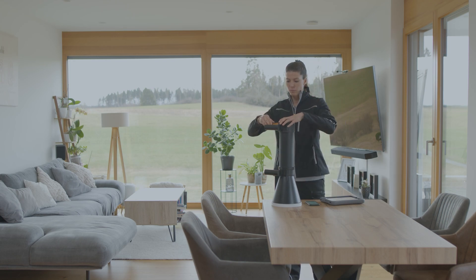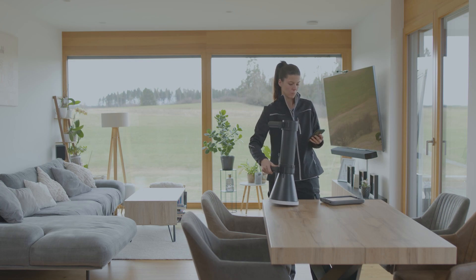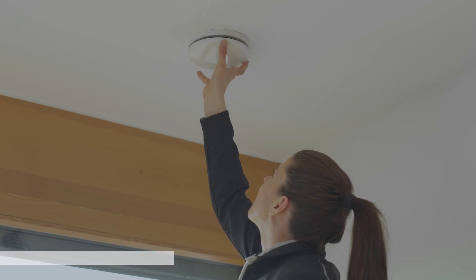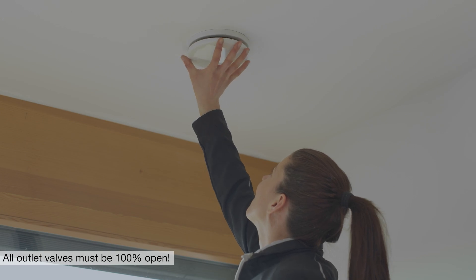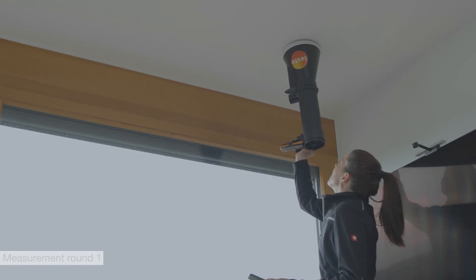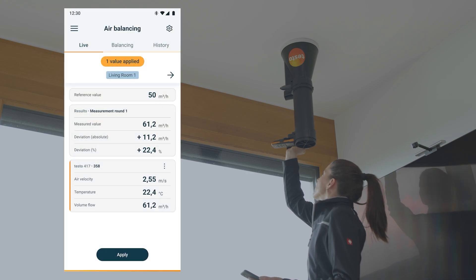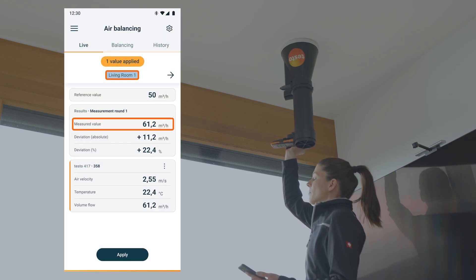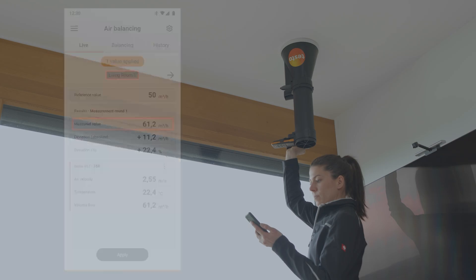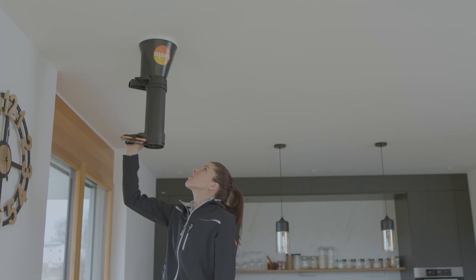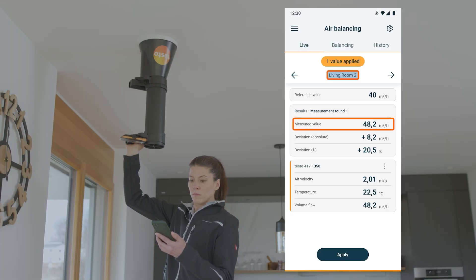In the next step, the first round of measurements is started. The volume flows of all outlets are recorded, and it is important that all outlet valves are 100% open. For each measurement, the measuring instrument is held with the funnel over the outlet so that all the air is directed over the vane. The measurement value can then be recorded with the Testo 417 and the Testo Smart app.